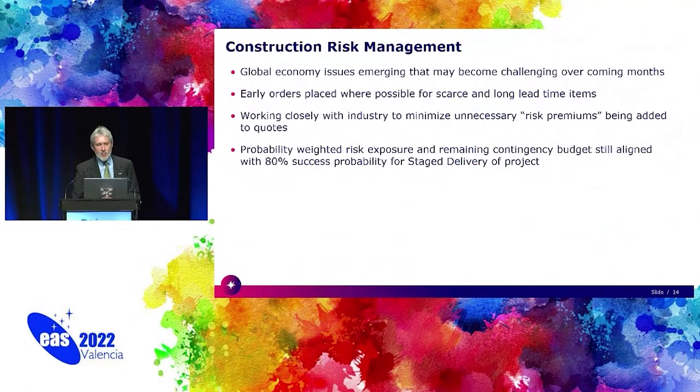One quick slide on construction risk management. These are strange economic times, as I imagine you can appreciate. And there are already issues emerging that could be quite challenging over the coming months. We've already reacted in a proactive fashion as much as possible to order early for long lead time items and those that are already known to be scarce.